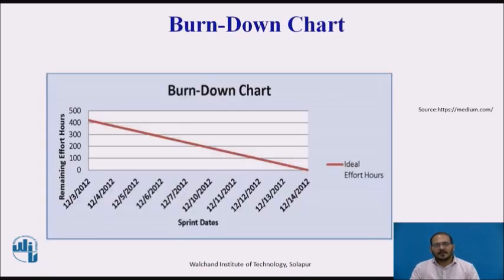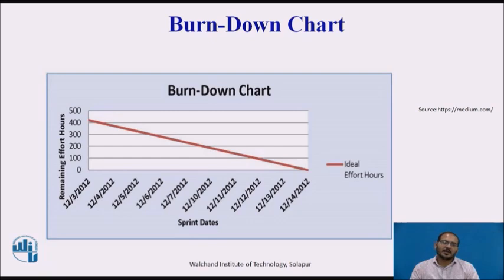We will see in detail about the burndown chart. This chart provides a graphical view of the number of stories in the backlog that have been completed against the total number remaining across the sprints. The burndown chart is used in the industry to track how much work is remaining for the project, or how many tasks are yet to be completed.